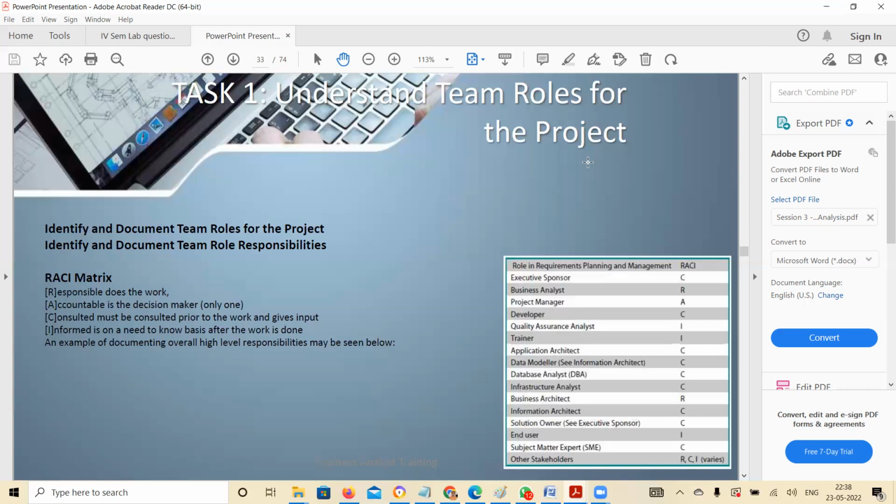And then you have consultants. C are the people who are neither responsible nor accountable, but they are available to answer any question. So if you need to know when we shall finish this training, maybe your HR person will tell me, Saurabh, you have to complete this before so and so because we are processing for interviews.